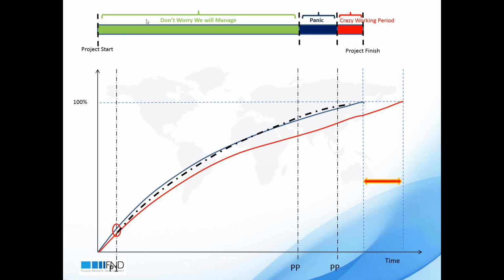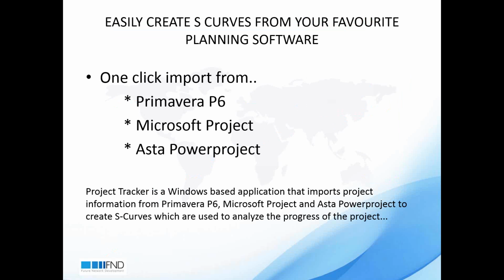And what we suggest is, if you plan well, if you have a control mechanism well, you can always get this kind of information at a very early stage that your project is going to be delayed. And then you can build up a recovery plan, and the recovery plan will allow you to motivate your team much more strongly, and then focus on the project, and in this way you can avoid the delay. And this is basically why planning is important, why the S-curve will help you if you use it in the proper place.